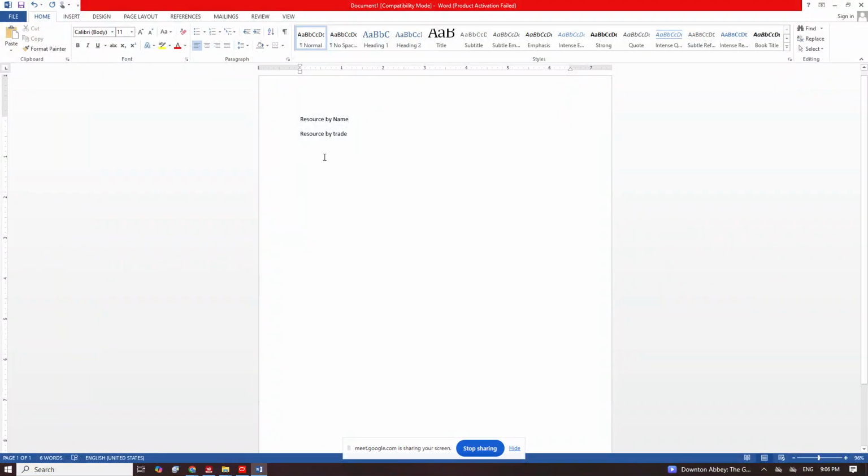In our case now, I can say team one under resource by trades. Team one contains one welder and two filter guys. Now, this is three persons in this team. So anywhere you see me creating resources, team one, it simply means one welder and two filter guys.